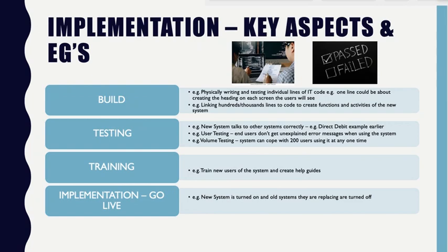In fact, the responsibility for ensuring the new system is implemented correctly does lie with the project manager, and they need to ensure that after the conversion period has ended, the new system is ready to be used across the organisation with no problems. The project manager should report back to the business owner's project board on how the conversion period went, any issues that still remain in the system, and how the project went overall. It's a very, very busy time for a project manager, and one where there's a lot of pressure involved sometimes.